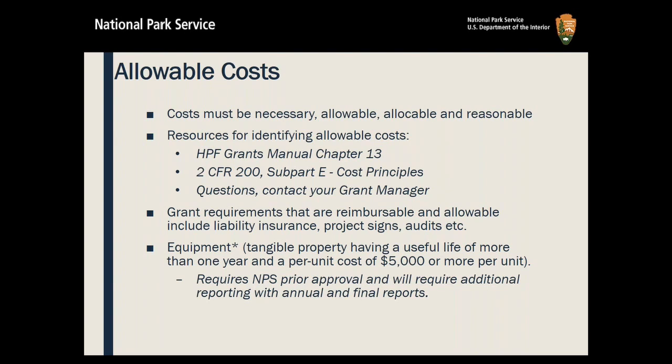So necessary means that it must be required as part of your project. If you're doing repair work to a house and you want to install an interpretive sign about the house, that would be a nice addition, but it's not necessary to the project. It has to be allowable, which means that it is not listed as an unallowable cost in the HPF grant manual or under 2 CFR 200.